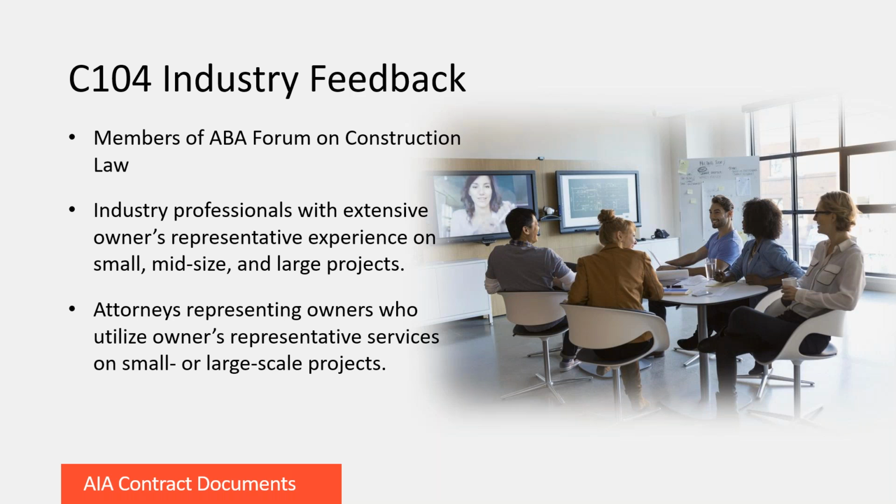But I mean, the opposite was also true. Poor communication and disorganization often caused delays on the project, either where the owner was trying to make decisions and was delayed in making those decisions, or even where the decisions were made, but the communication of those decisions was not very timely. Any one of those instances could create problems on the project. Yeah, you know, that's always been my experience as well.